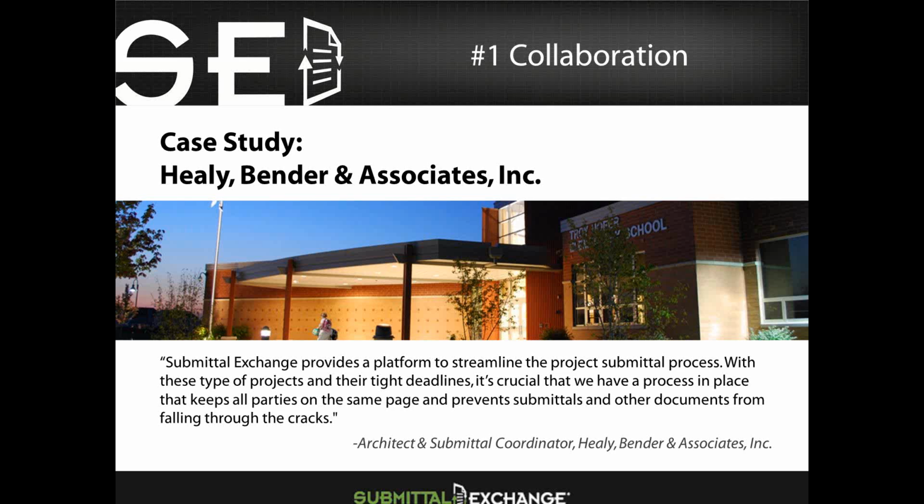Contractors had requested to be allowed to make electronic submittals. The concerns with file server space issues prompted Healy Bender to research several web-based software options, resulting in the selection of Submittal Exchange. In serving educational clients, many projects are summer maintenance projects, which present a very short time frame for construction. And meeting those condensed timelines requires that submittals are reviewed and approved to allow for necessary lead times. In some instances, there is less than a month between contract signing and work starting.